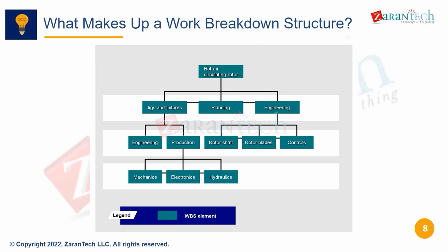In the oil and gas industry, usually they have WBS structure for each oil well. Each well, they'll have one WBS element. And then they'll also use investment management sometimes together with WBS element to keep track of yearly how many new wells they are making. Okay, so investment management integrates to this project level, and then you have another structure like this within investment management, where there are multiple projects assigned to an investment program.